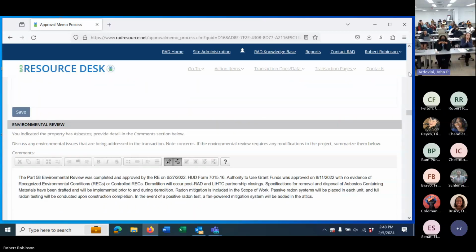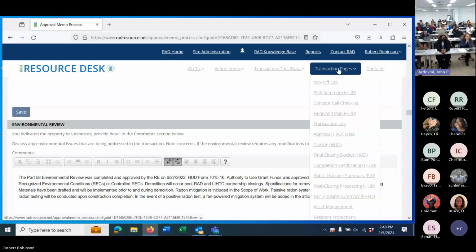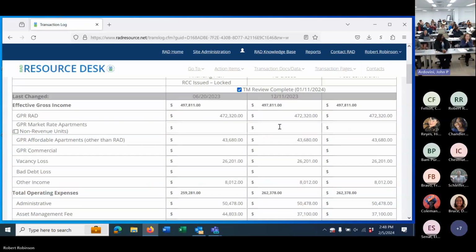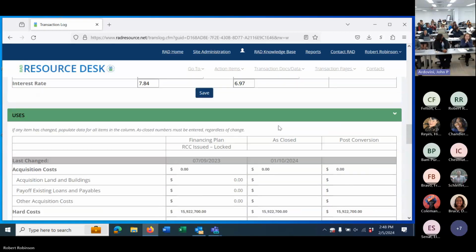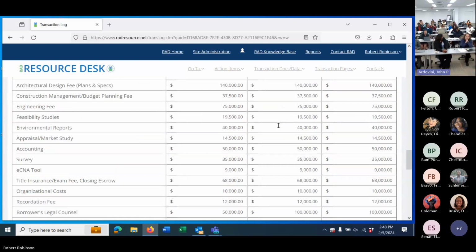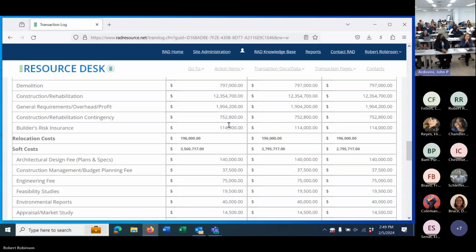One thing I noticed though, when I was looking at it, was that the rehab contingency was at 5%. I know Carly helped through this deal. Do you remember why they used 5%? They got approval from the tax credit investor, 5%. So that was permissible by HUD, right, with its new change. And in new construction, we just see less retro business.